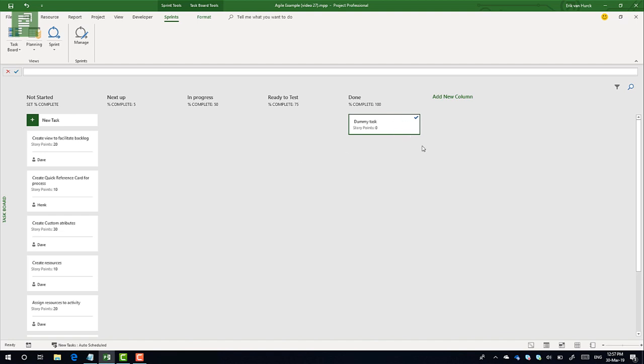Now, another thing on the board that I'm very interested about is the ability to add filters. There's an option to filter on two things. You can filter on the summary tasks and on the resources now. This is very cool because what I actually did is I used my summary tasks within the Gantt chart as being my user stories. So I have different user stories in the current situation, and I use that user story to gather my activities.